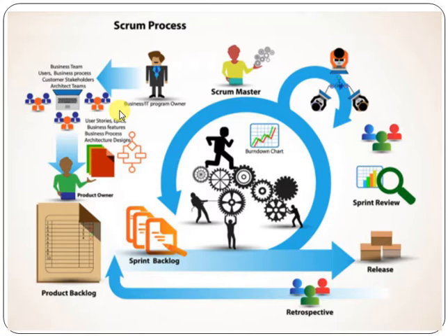Now in Scrum, we use the concept of a sprint. A sprint is a 3 to 4 week time period in which we divide the tasks into chunks. For example, if there are 40 tasks, we can make 4 sprints and each sprint will have 10 tasks. Sprint 1 will take the first 10 tasks and we plan, develop, test and deploy those. Then sprint 2 takes the next 10 tasks, sprint 3 the next 10, and sprint 4 the last 10. Once we reach sprint 4, we will have completed all the 40 tasks and everything will be delivered to the customer.